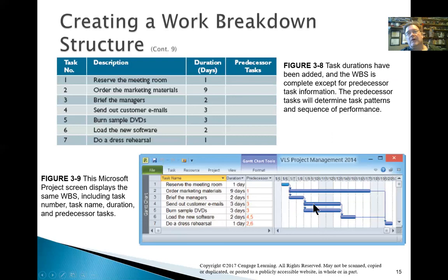All right. I think it's not a bad idea to at least design your project like that first, even if you know there's only going to be one person working on it, because you want to communicate what can be run in parallel. Because at a certain level, you may not even have your team established yet. So it's good to know the work breakdown structure for the project. Then in theory, you could decide who's going to work on the project. And then you might find that you can't run these in parallel. And that will basically start to push the project around.